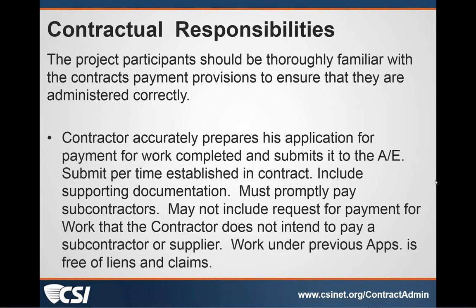From Kevin O'Byrne, he says, courts will deem as enforceable a pay when paid clause. The ones that are often the sticky point, that may be unenforceable in some jurisdictions, are the paid if paid clause. They are two different things, pay when paid versus paid if paid, and I don't want to get into the weeds in that too much unless folks want to, but it does vary by jurisdiction, and in North Carolina, neither of those clauses are enforceable, based on the state statutes that we have here and our public policy. So you can check your statutes. They vary from state to state, and I know there are some states that do enforce pay when paid clauses. Like I said, North Carolina does not.